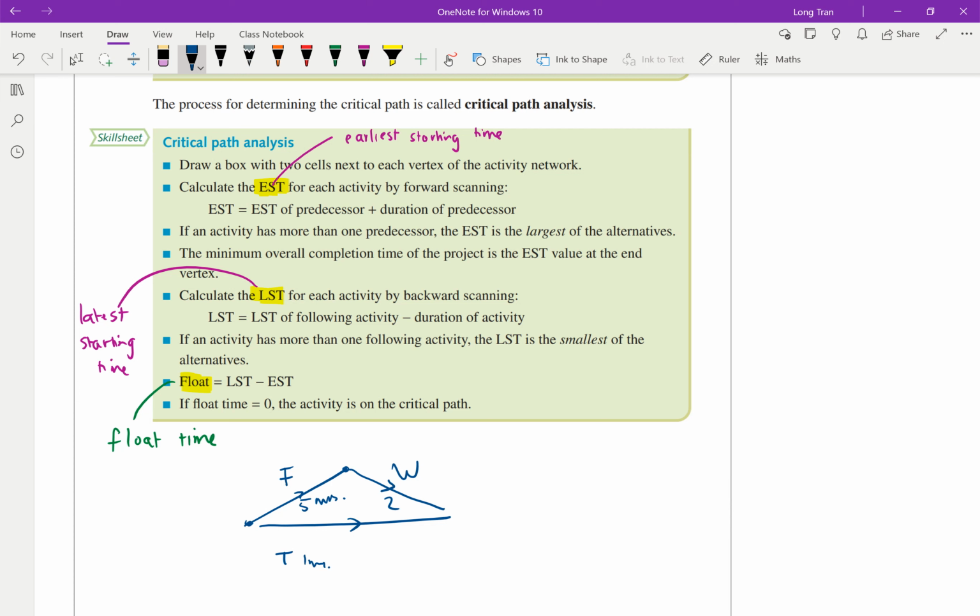What's the longest time that's needed in this particular activity if we had to count it? So from the starting point to the finishing point, how long does it take overall? If you had to account for a time, how much time would you account for? 7 minutes. Because the longest time that it takes is 7 minutes for this person to finish it. Even though it takes this guy only 1 minute, it takes 7 minutes overall to ensure that's the minimum time allocated so these people can finish their job, right?